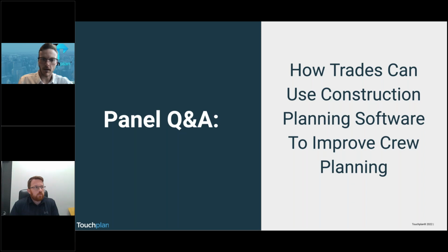Gotcha. Perfect. And using Touchplan, have you been able to find any significant gaps in the schedule yet, or really say, hey, we were able to get into here and do work that otherwise you would not have found with that process prior? Well, yes. As far as managing manpower, we've taken the Gantt export and modified it to show weekly trends for manpower needs and to fill in gaps across large areas and company-wide, to say, it looks like this person's short on work over here.